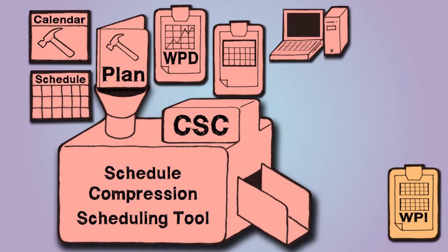The outputs of the control schedule process include work performance information. Work performance information is the project performance data created by analyzing the schedule variance and the schedule performance index against the work packages. It's important to note that most of the processes that fall under the monitoring and controlling process group will have work performance information as an output.